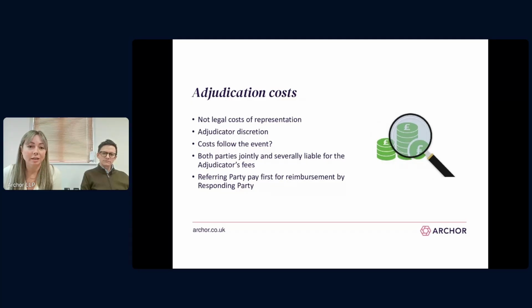Now, the adjudicator has discretion to apportion his or her fees as he sees fit. So normally adjudicators' fees follow the event. If a party is successful, the losing party has to pay the adjudicator's costs. But quite often there's a rough and ready apportionment of this. Adjudicators might look at whether any unrealistic claims have been made that haven't been successful, or whether submissions have been unnecessarily long with case law that's not relevant. Adjudicators can consider all of those things.